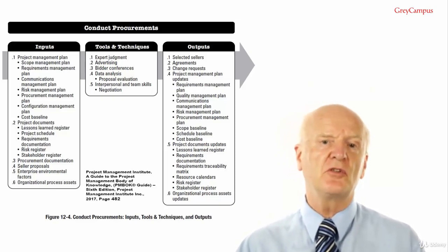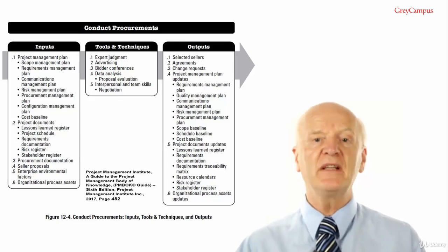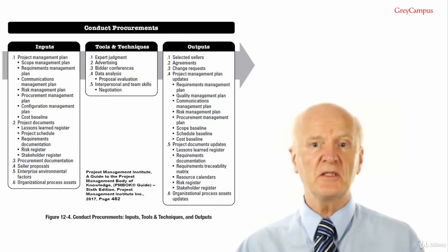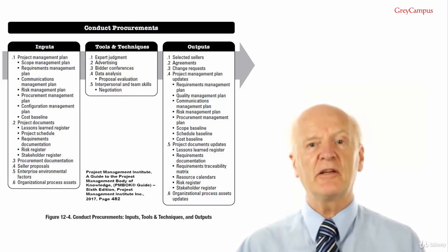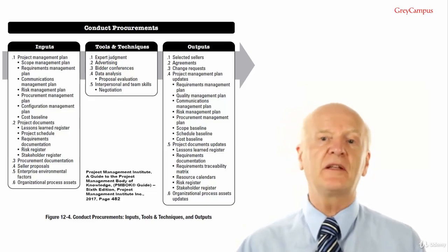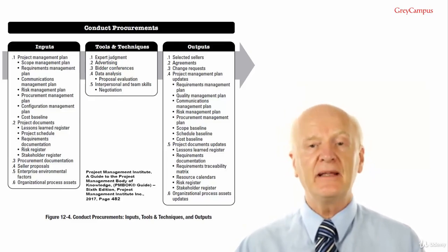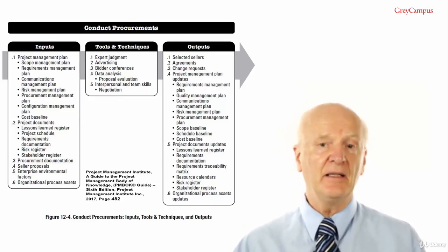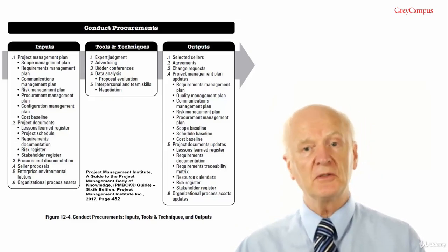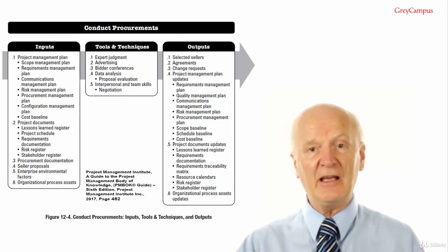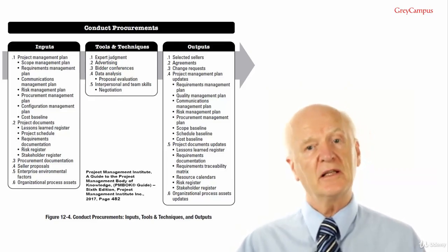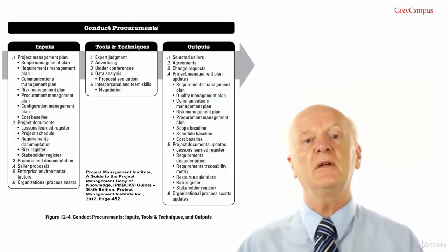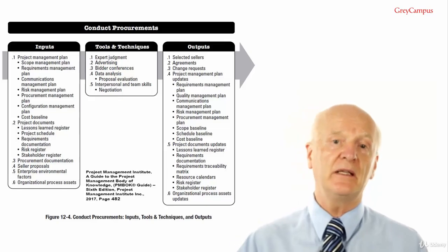Proposals are evaluated to ensure that they are complete and respond in full to the bid documents, procurement statement of work, source selection criteria, and any other documents that went out in the bid package. And that's why, as I said earlier, I design the forms for their response. I tell them the font color, everything, so that they all come back from all the sellers looking extremely similar. I can compare them and contrast them very quickly and easily.